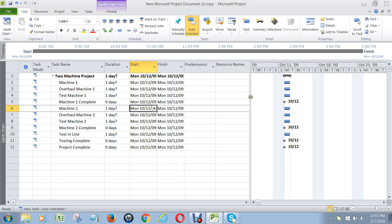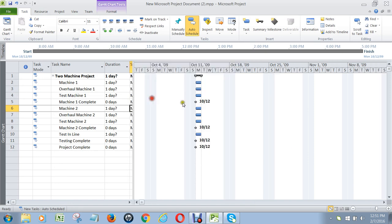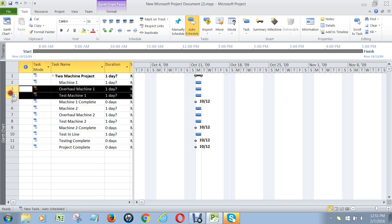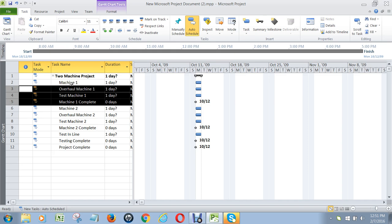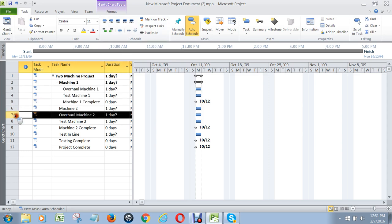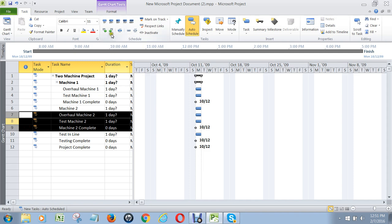Now what we do — I'm going to put this back so you're not distracted — is outline overhaul machine 1, test machine 1, and machine 1 complete, and make those go underneath machine 1 so that machine 1 becomes a bold summary task. You highlight all the tasks you want to be under that summary task, just like we did with the main project summary task, and then hit the indent button. Then we do the same for machine 2 and indent.